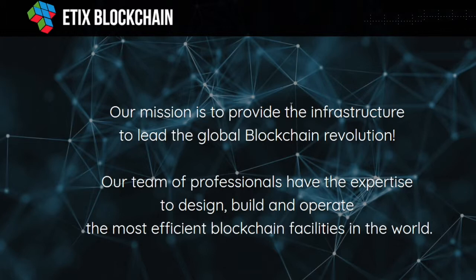Now, if you know how cryptocurrency companies work, timing is always key. They want to make a decision now. They make their decisions based on what's happening in the marketplace. And once they've gone through their process, they come to us last and they say, we need it done yesterday. So we had a time frame of 6 months. So 6 months from the first brick in the ground all the way to it being operational, 6 months. A day later, we start paying fines. So we had to do it in 6 months.